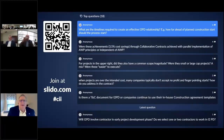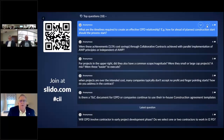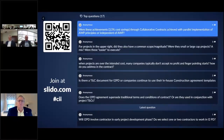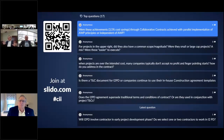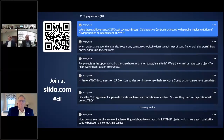The second question: were the 3.5% cost savings through collaborative contracts achieved with parallel implementation of AWP principles or independent of AWP? The research reports Bruce quoted were independent of AWP. In the coming weeks we are starting our first I2PD project using AWP construction planning best practice, putting the two together as discussed yesterday. We think we will see additive results out of that — stay tuned. That project will be fully executed about this time next year.